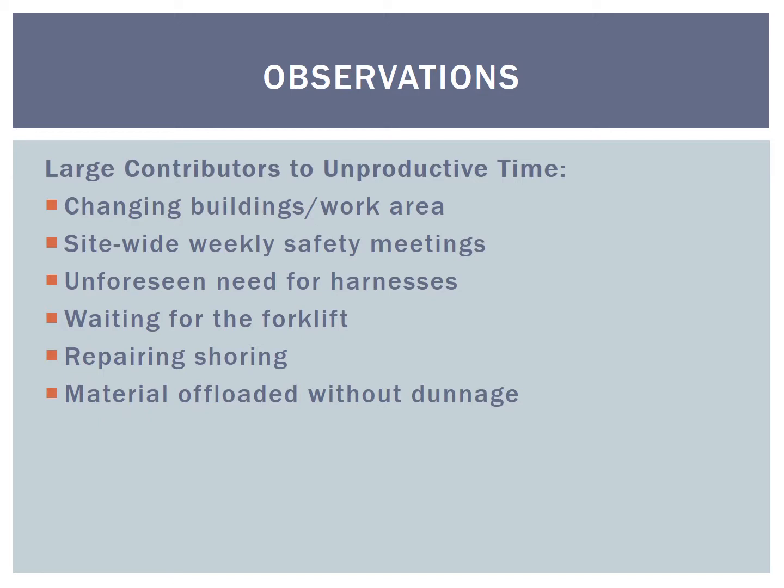Through spending time on the site over the past couple of months, I identified these activities as large contributors to fieldwork inefficiency. They did not all lead directly to 30-30 rule violations, but consistently came up in my field notes as areas for improvement. One to note is the Monday morning site-wide safety meetings that delay productive work for all workers. These meetings are valuable because they inform everyone of potential hazards and where other crews will be working throughout the week, but they could be run more efficiently to improve overall site efficiency.